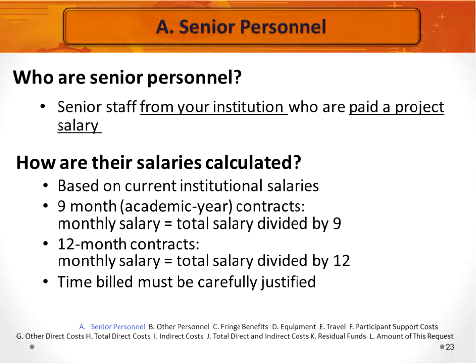And so those of you who were with us at that time, remember we talked about the senior personnel and how you report the time they're going to have on projects on those forms. In the budget justification, and in a required list of individuals receiving compensation from the grant, these same senior personnel are going to show up in all these places. So the information needs to be consistent from place to place throughout the proposal. It's easy to get tripped up, so be careful and consistent.